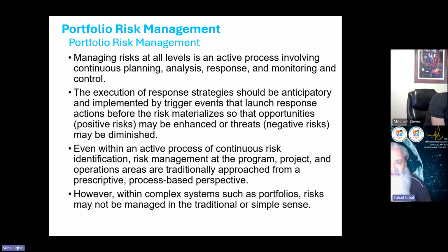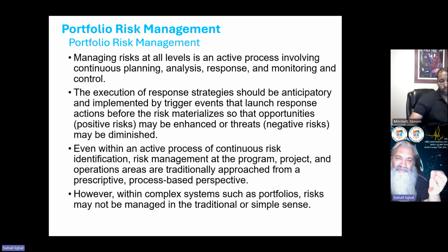Although it is a very lengthy statement, it is a very simple statement. When we create the risk strategies, we execute them. And this execution should be anticipatory and implemented by trigger events. When a certain trigger is invoked, we will immediately initiate the specific response strategy.